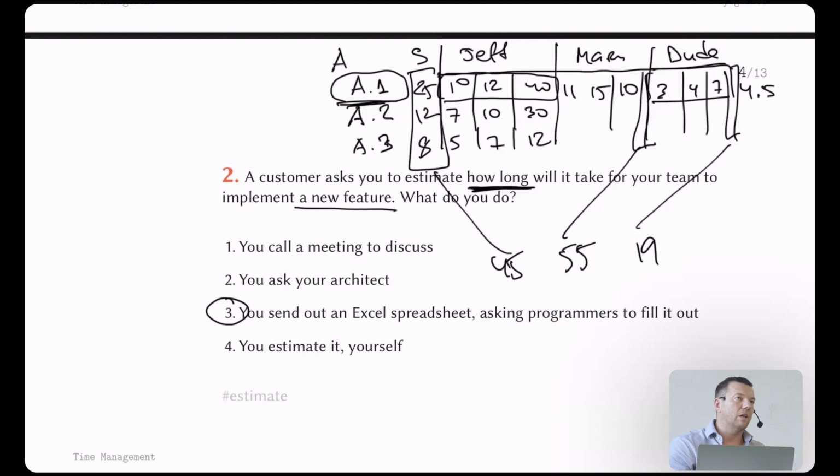In this case, I would even ask to estimate like this, to have that cross estimate. I would ask the back-end programmer to estimate the front-end feature, and the front-end people also to estimate the back-end feature, to see how they understand. If there's going to be a very big distance between their estimates, then I will question myself whether everything is good in my project.